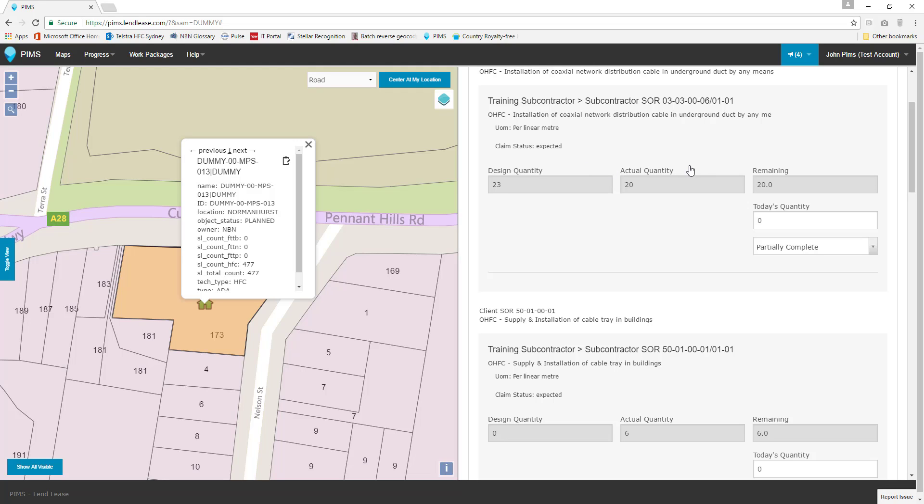The actual quantity is the current real-world number for this work. The third locked field is the remaining quantity field. This number is automatically determined by PIMS based on progress entries. It informs us, at any given point, the remaining total of work outstanding against a schedule of rates.